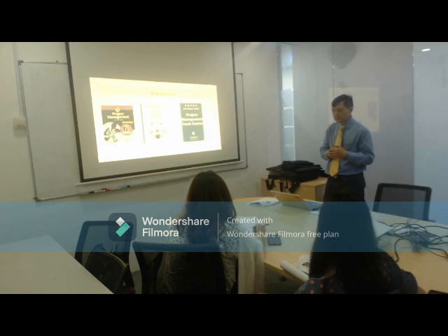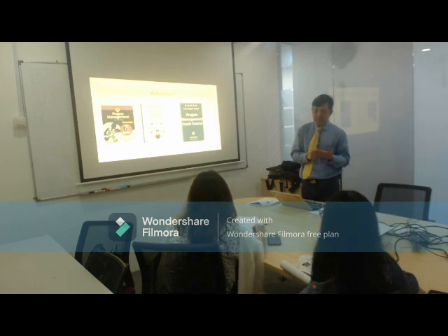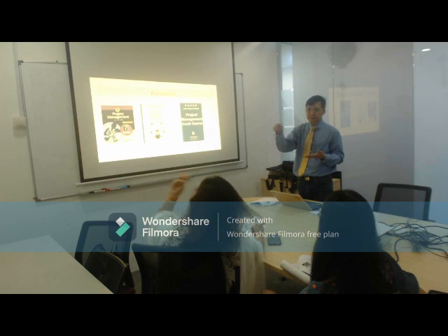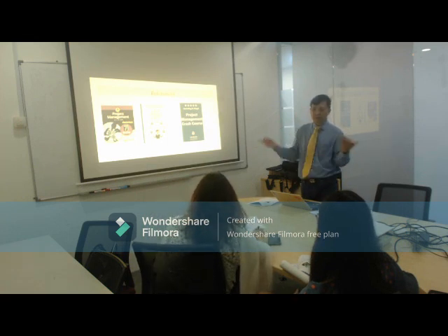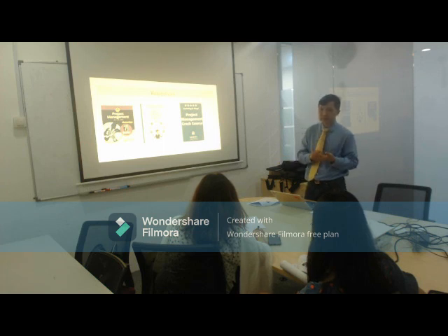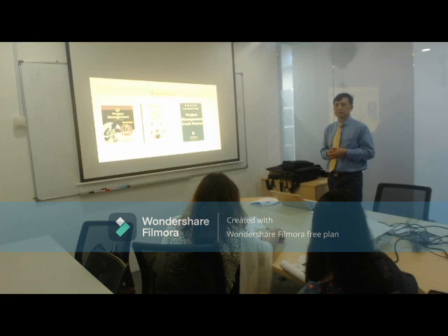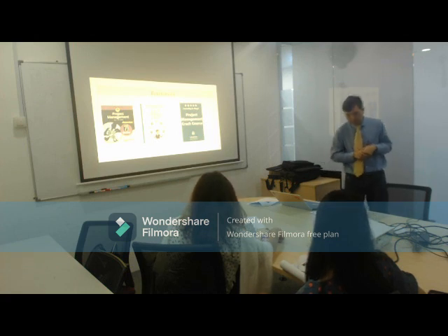The painters, the lesson learned is that they're all from the same family. One person sick, all sick at the same time. No work can get done. Very high risk. You may need to think about another painter. Those are the things that come into the picture. So take time to complete your second assignment.